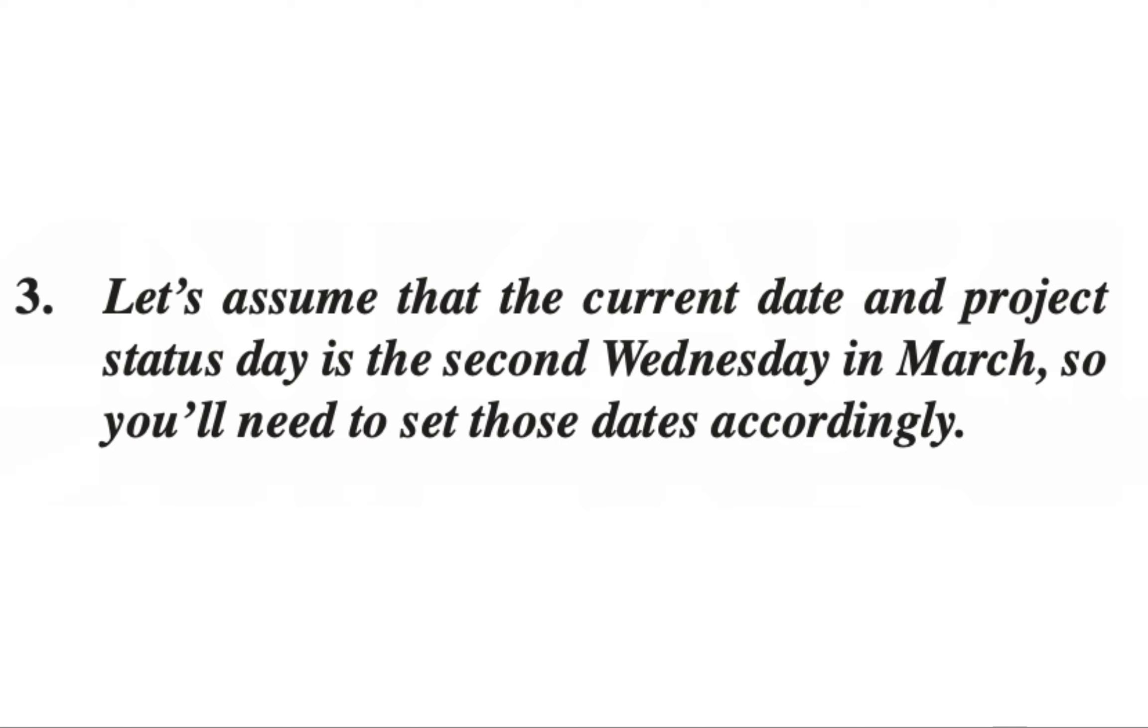Well, it's the date and time of your project that you want to use to compare against your baseline. In other words, what's the status of my project on that status day as compared to the baseline that I created earlier? The baseline will represent the budgeted or estimated information, while the status date information will include the updated information, which I entered just a few minutes ago with the modified duration and the updated percent completion.